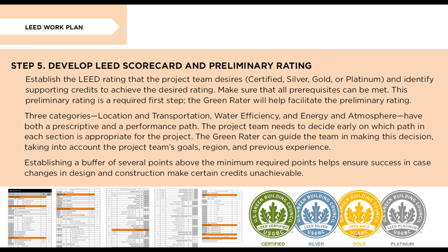The Green Rater can guide the team in making this decision, taking into account the project team's goal, region, and previous experience. Establishing a buffer of several points above the minimum required points helps ensure success in case changes in design and construction make certain credits unachievable.